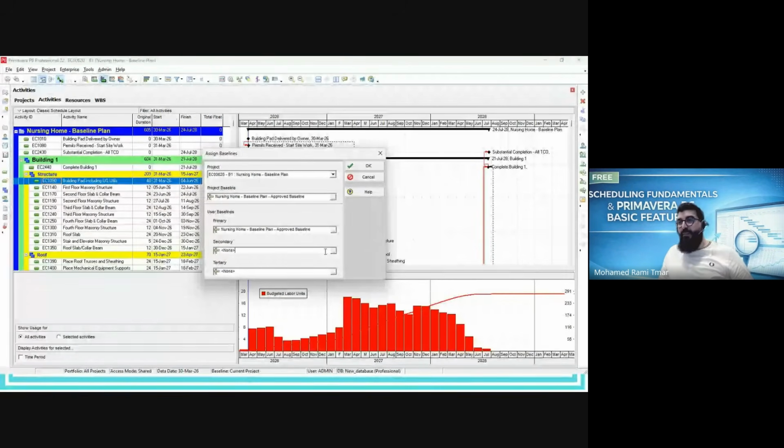Even with integration, you need to go and make a manual check if the progress is accurate, if the progress is good. Maybe you need to do an audit to check the other system. In engineering, maybe we use document control software like Aconex and others. We use this to verify the status of the engineering progress, if this document really went issued for review or for comment or for approval or issued for design or for construction, etc.